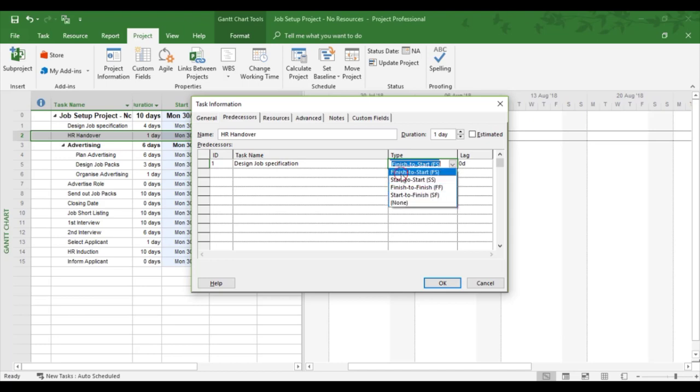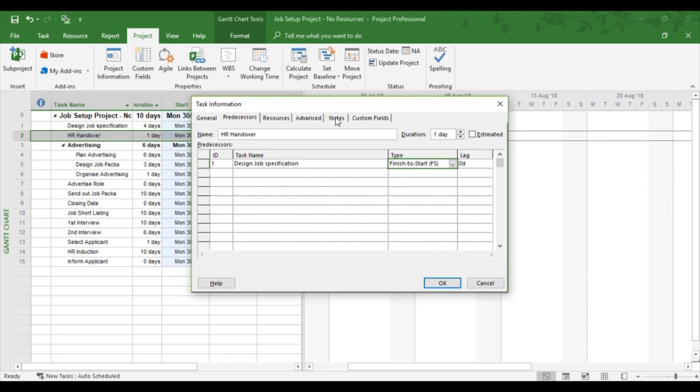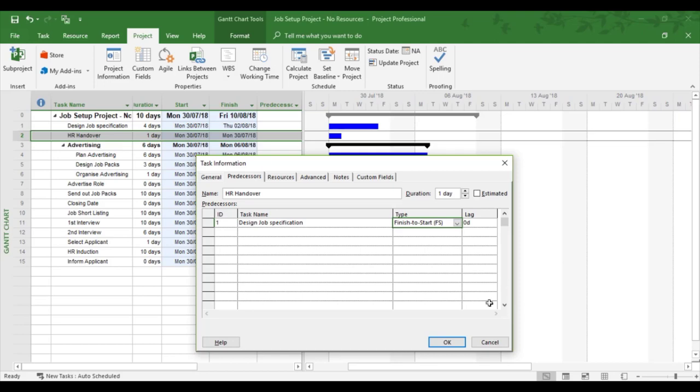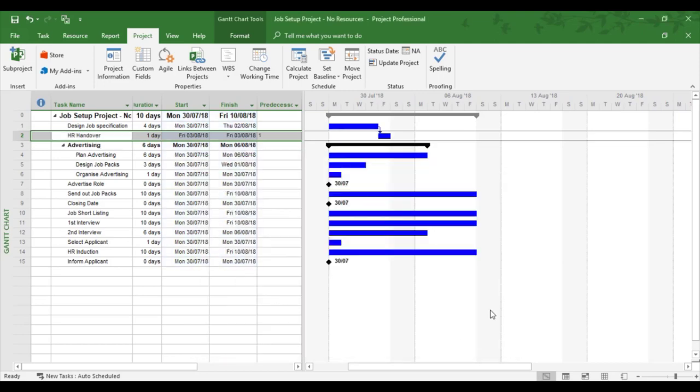So if I look at finish to start, what that's going to mean between the two blue bars is the predecessor task, which is task 1, is going to finish, then the next task, which is successor task, will start. That's what finish to start means. So I'm going to click OK, and we can now see how the blue bars work.